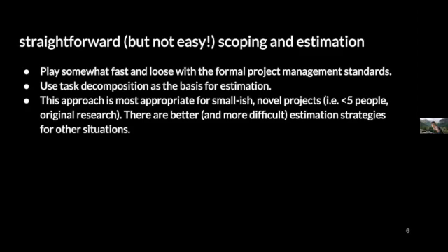The approach I'm outlining is called task decomposition. The idea is that you take a big project, you break it down into small pieces, you estimate each of those small pieces. This works because small pieces are easier to estimate than big pieces. And also the errors on many small pieces will tend to average out if you do it correctly. That is, some of the pieces you'll overestimate, some of the pieces you'll underestimate, but your slop in your ability to estimate will tend to average out over the project, and hopefully in bulk, you will actually end up with enough resources to do the work you need to do.